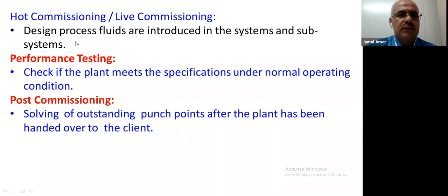Hot commissioning and live commissioning: design process fluid is introduced to the system and subsystem. Performance testing checks the plant meets the specification under normal operation conditions. Post commissioning is also a very important thing. This is after accepting the result of performance testing. We have some period we call post commissioning. This is to close out some items of the punch list which we selected as punch list items before startup of the plant. During this period, we can solve these punch list items, which don't affect the operation of the plant.